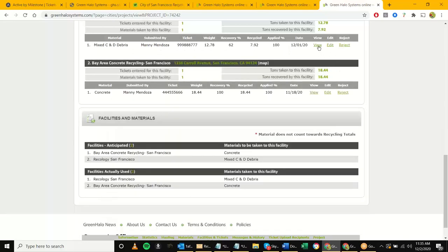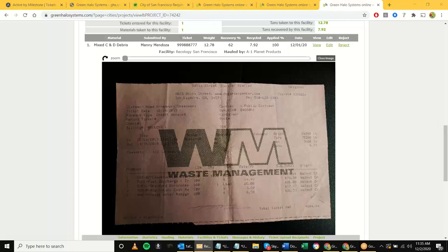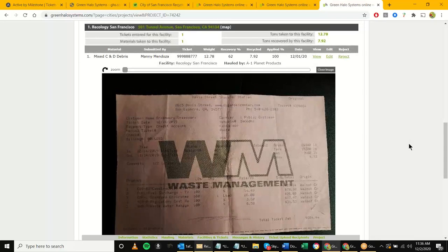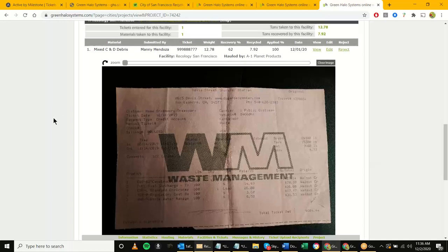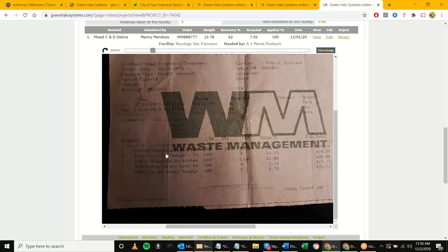James asks to hold for a moment — it's important for city reps to be aware of common inaccuracies found when reviewing tickets. Focus on how the facility received the material. Did they bring it to the right facility? Yes — mixed C&D debris to Waste Manager syncs up. But read the receipt carefully: the ticket may say it was received as 'trash,' but the contractor logged it as 'mixed C&D debris.' That's a big difference in outcome. If the facility received it as trash it went to landfill; if the ticket says it was received as 'construction debris,' it is awarded the recovery rate for that facility and for that material type. That's really important during your reviews.